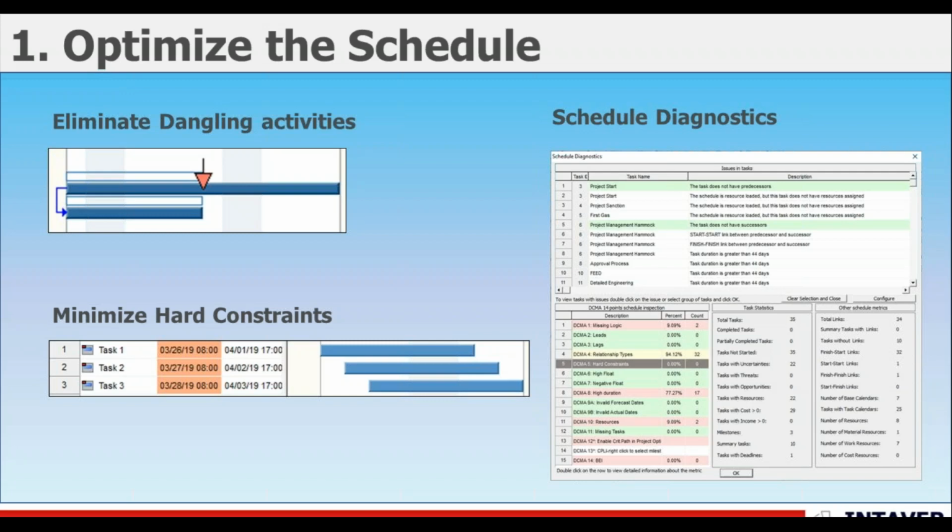So what we're saying there is, at each iteration, because of the random nature, picking various values for start, finish time, duration, it could be costs, the schedule basically will expand or contract or shift in each one of these iterations. If that schedule cannot do that, then the schedule will not be valid. The analysis will probably not be valid.